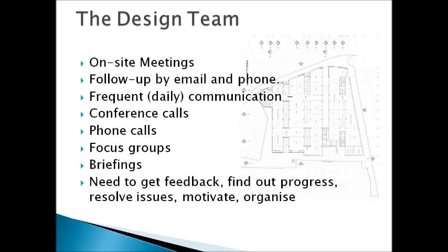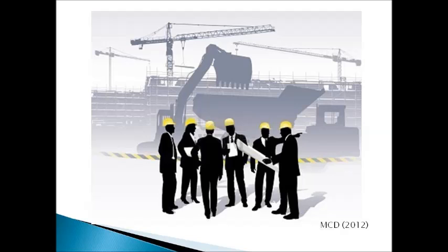Frequent communication within the design team ensures the project is running smoothly and tasks are being carried out on time. On-site briefings by the project manager help to get tasks performed in the right order, such as the architect's site inspection with electrical and mechanical engineers to create a list of defects and then gaining approval from the client, or the creation and approval of the O&M manuals or health and safety files requiring communication between the consultants, CDM coordinator, sub and main contractors, and the facilities management team.